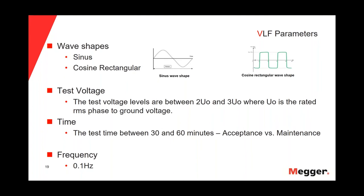On the other hand, if we are doing a maintenance test on a cable that has been in service for 20 years, we have a risk of wire trees. We know that wire trees grow very slowly, so we will need more time to convert and propagate the wire trees. For that reason, we need to extend the test time to 60 minutes.